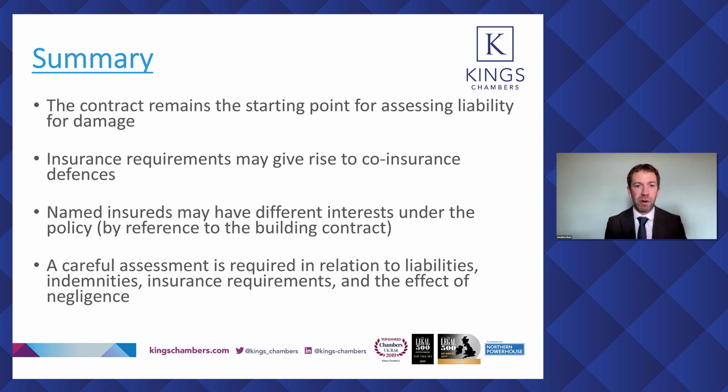My other tip is to be very careful when making bespoke amendments to standard form contracts, because I started by observing that whilst on first blush you may think liabilities inter partes on the one hand and insurance on the other are distinct, actually, as we've seen, they're very much interrelated. And for example, in the JCT suite, the overall scheme for dealing with damage, and to some extent I think the same is true for the NEC suite, will be spread across a range of different clauses, which on the face of it deal with different matters.